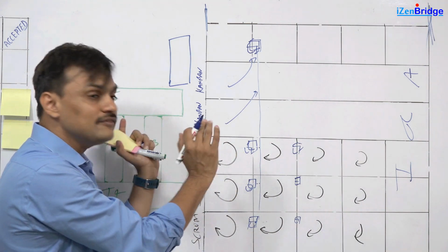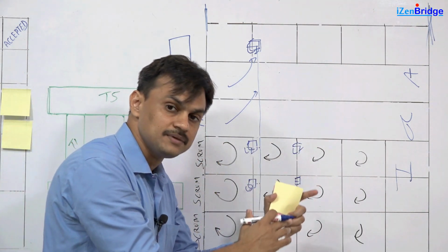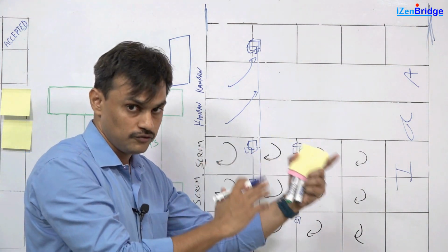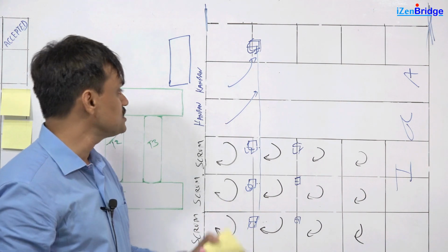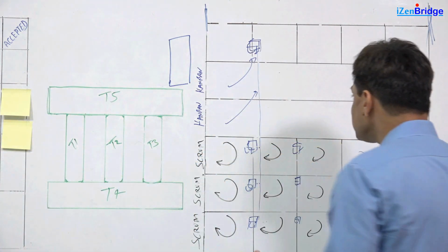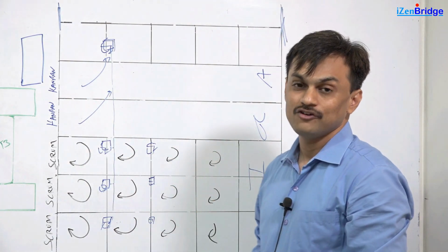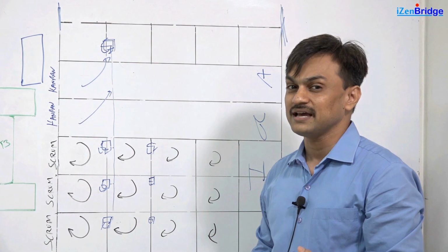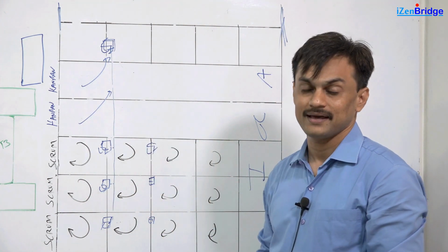So we cannot leave a Kanban team as a different team who is not using estimation and who is not participating in the forecasting process. So that is a rule, or a constraint, applied on Kanban teams. Rest, they do have flexibility in that window, and that is why the shared teams or the platform teams use Kanban a lot.